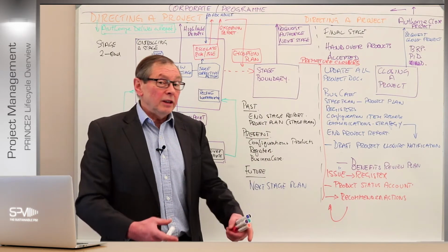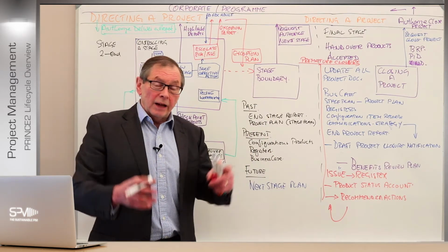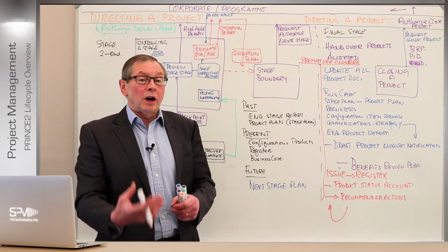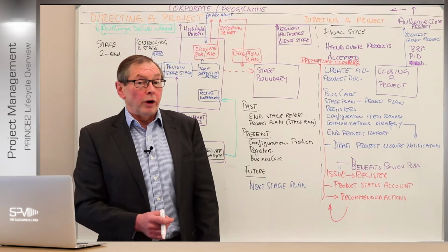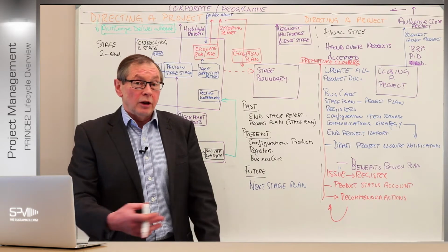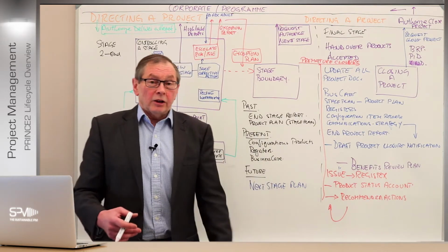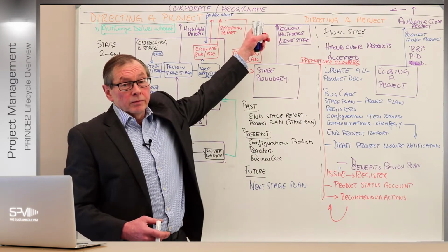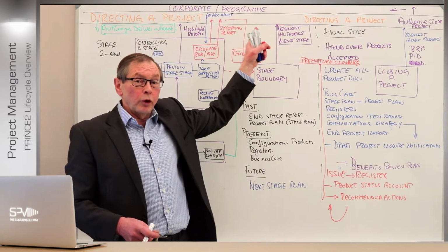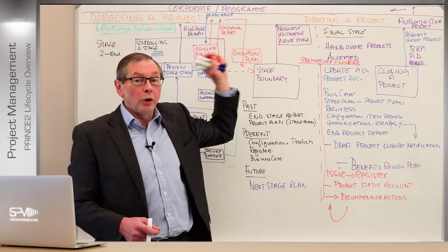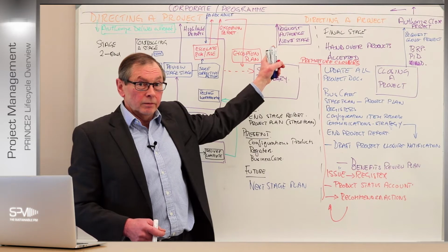So it's doing everything in detail, a piece at a time, getting the level of detail a piece at a time to make sure we've got the governance in place, so that we only go when we need to go and when they authorise us to go to the next part of the project, and hopefully get to the end. Because at the end of the day, it's their project. It's the project executive's project. That role is accountable for the project's success. Nobody else. That role is.